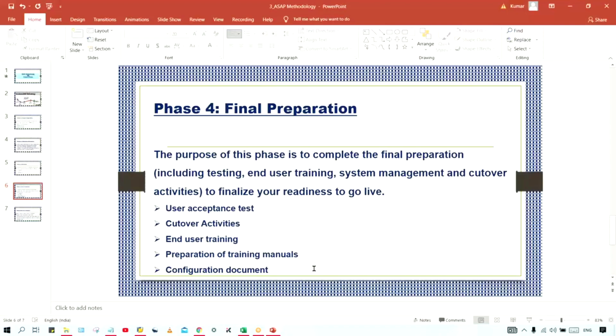If any development is done, then for that development multiple functional specification documents are prepared. That is also handed over to the client. What is a functional specification document, guys? I'll let you know, don't worry. I'll explain in detail in the next session. So all these documents are handed over to the client. Later, if the client switches to a different organization for support, these documents help those people understand the client's business process, what exactly we have done, and what exactly we have configured. They will read the documents and get an overall idea about all these configurations. That is the major benefit.